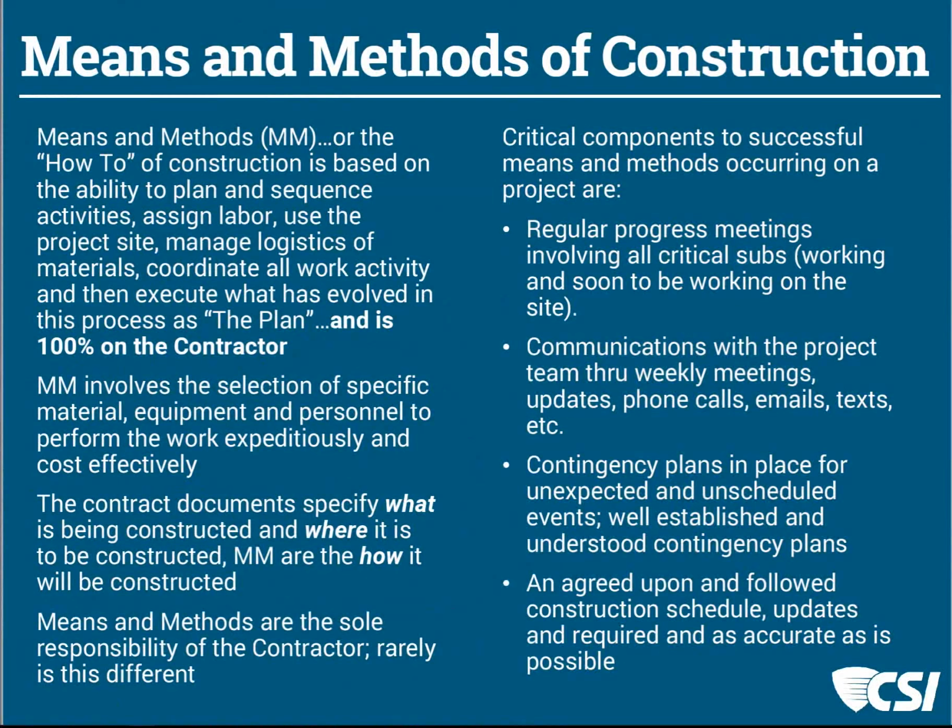So it is a responsibility of the architect and engineer to provide a set of documents that meets the code. It is also the contractor's responsibility to meet the code while they are installing that work. And it's their duty to coordinate inspections with those authorities so that those authorities have access to the site to look at and inspect and confirm that, in fact, that work is being installed according to the code.